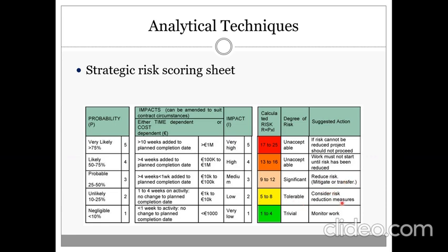For the low risks, in this case, we can consider reduction measures, but the risks are less than the risks that we have for the third category. And in many cases, for the very low risks that we have, we might accept those risks and we can go for work. That's already included in the contingency of the project that the planner has assumed at the very beginning.